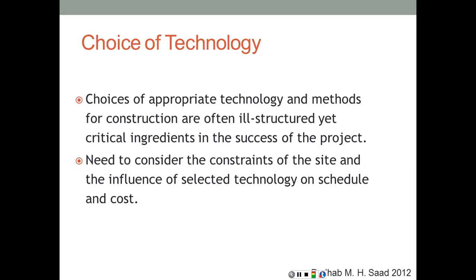So weather constraints, for example: maybe there are some activities that have to be done in a dry environment, so if it rains, we cannot perform them. The tower crane should not be working when the wind speed exceeds a certain speed and things like that. So we're going to look at the meteorological reports from previous years to try to identify what constraints are going to be imposed on our construction activities.